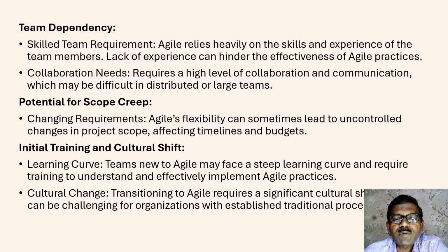Team dependency, potential scope creep. So as things go on changing, because it is absorbing flexibility, obviously the scope may expand. New things will come up and you have to absorb them. So the budget may expand accordingly, and the timeline may expand. So all these things are some drawbacks.